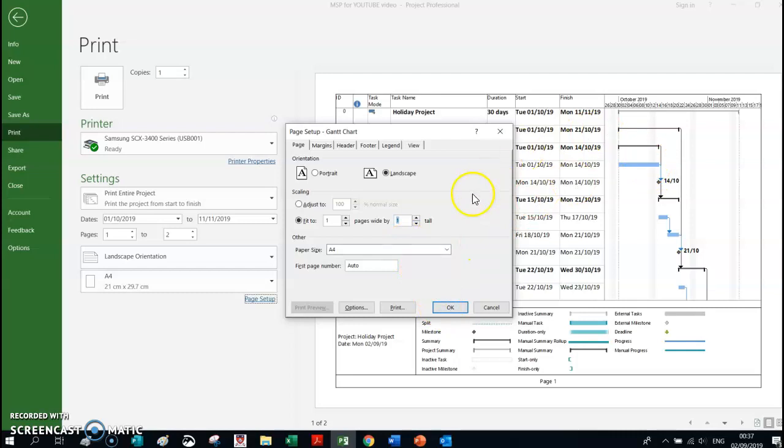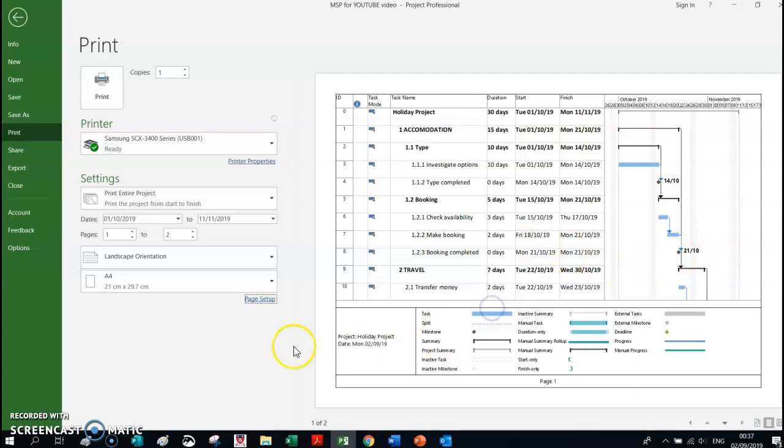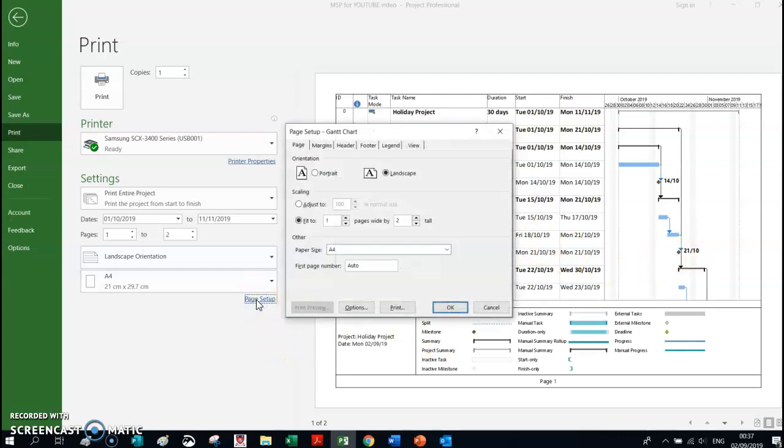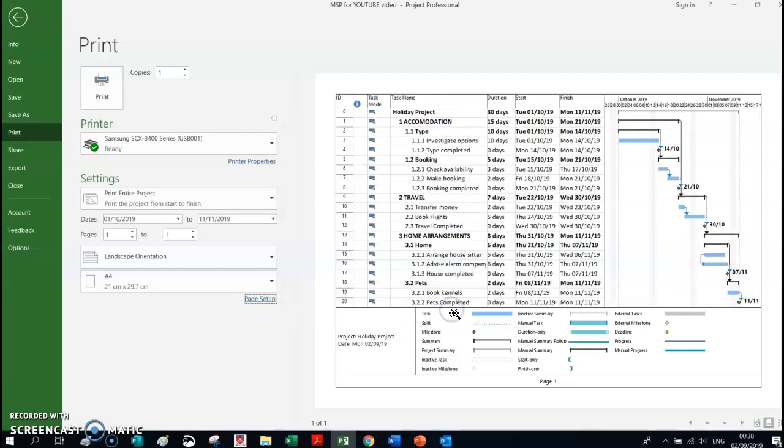So for you to make it presentable and to be able to print nicely, you just go there again. You're going to click on Page Setup, you're going to go Fit To, and you're going to play with these numbers here. 1 page wide by 2 pages tall will probably work really well for you. Alright, I'm just going to make this 1 because mine looks ugly like that. And then the trick is obviously to make sure that it prints beautifully. Alright. Go back.